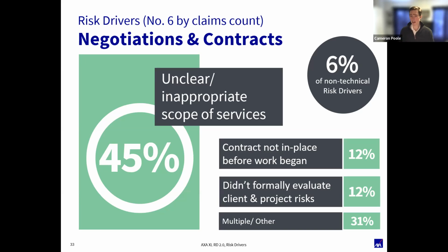A limitation of liability clause, that's something in the single family residential world, in my experience, you can almost always get across. And that's a clause that just says, our liability for this project is limited to our fees or $50,000, whichever is greater, right? So no matter what you cause them in damages, you're only on the hook for $50,000 or your fee. It's unrealistic on some larger projects, more sophisticated clients. But again, in the single family world, what I've seen is folks have a really good success rate with getting that across. So I think it should certainly be in your terms and conditions.